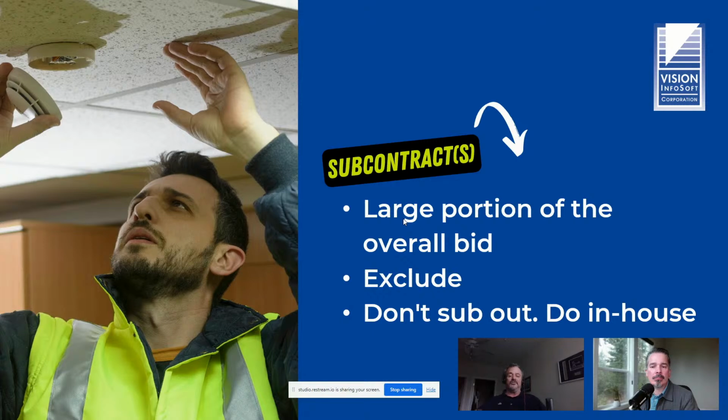Now I've got a lot of customers these days who, partly for that reason, just don't bid things like fire alarm. They just don't bid any portion of it, not even the backbone conduit and boxes and all that. They just exclude it altogether from the bid and leave it to the general contractor to go out and get a separate complete bid on the fire alarm. So that's one option, is just to exclude it from your bid.